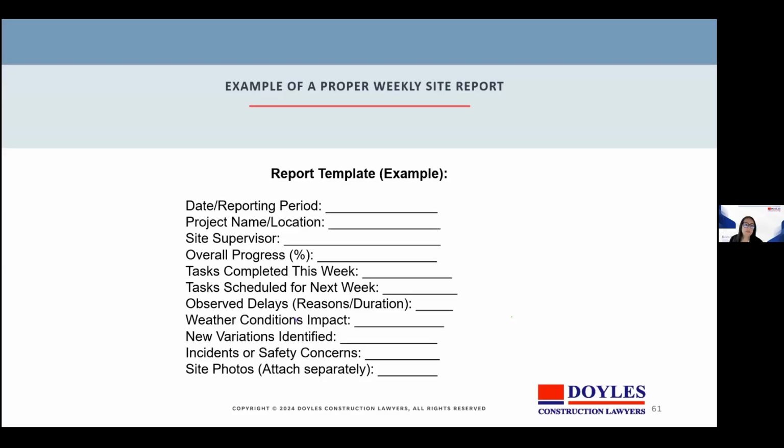So here's an example of a report template, and it shows what a meaningful report should look like. The date, the project, the site supervisor, the overall project progress, tasks completed in that week, variations identified, any incidents, and includes some site photos.